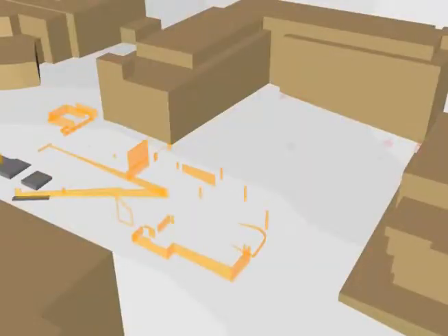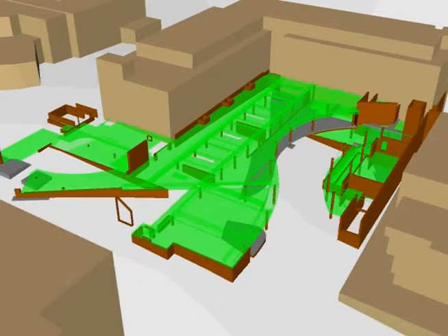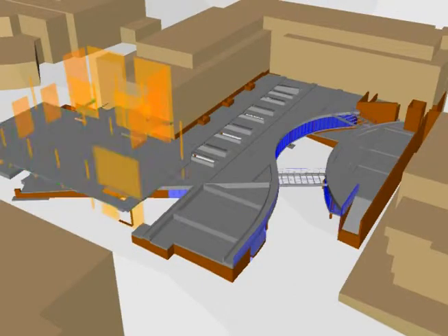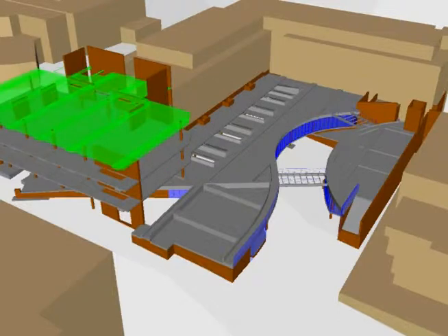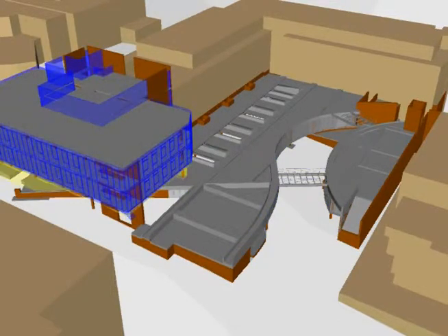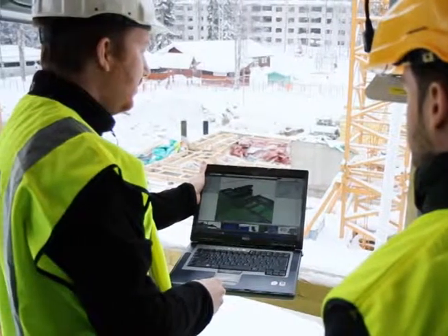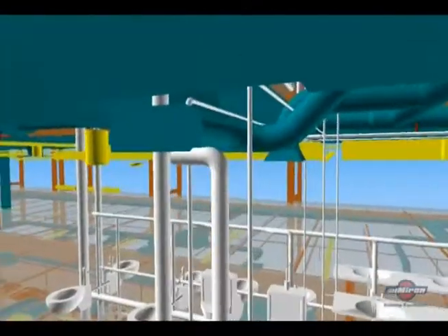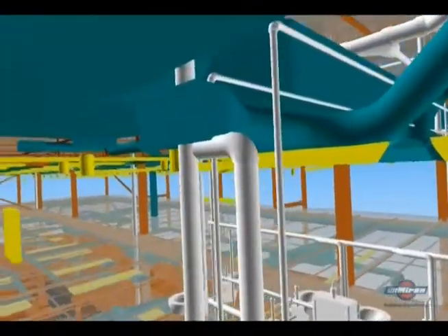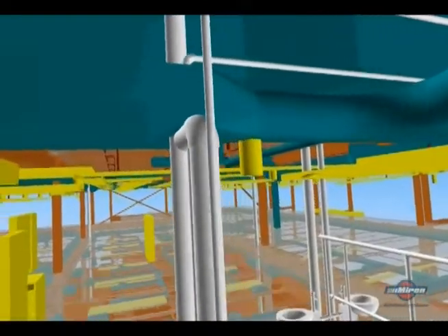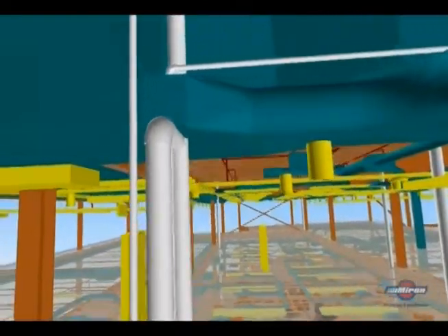And the level of detail that you go into will vary based on projects. Whether you want to detail every single nut and bolt on the project or you just need very basic shape geometry, it's a matter of what you're going to get the most value out of. One of the greatest returns on investment that we're going to see in the construction process is taking those models to the field. And for the work that we self-perform, we're able to break apart those models, understand the models, and then sequence the construction through that whole process.